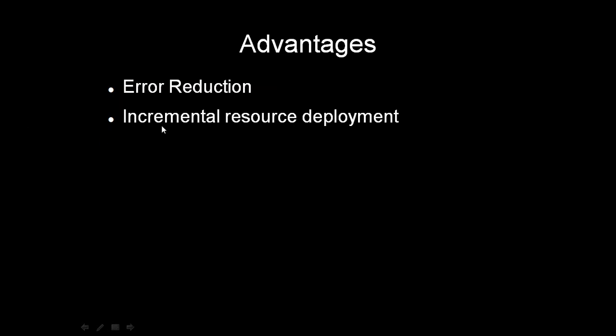And the second advantage is incremental resource deployment. That is, the customer need not invest huge resources for the whole software because we are delivering only part of the software. So we don't require that much server capacity for the customer because we are not delivering the whole software initially. They need to spend only a small amount of money at the initial stage. Later on, they can add the resources. If you want some more hardware upgrade, the customer can upgrade the hardware in the second stage. Like that, it will go on. So incremental resource deployment is there for the customer.